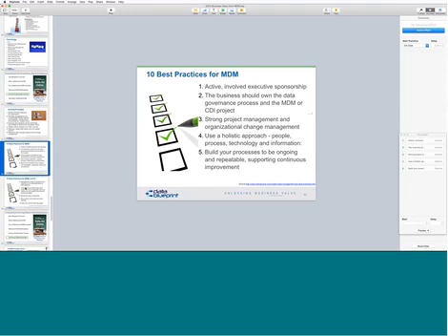The fact that you have a golden master for all your customers, what does that really mean? Well, if it's reducing the amount of time that it takes to be in contact with your customers, that's great. If it's making your data scientists in your organization more productive, that's good. But if the data scientists only deliver $1 million value and your MDM costs $2 million, you've still got a problem there. So again, trying to get to that business case with those activities is very definitely the way I would say are necessary but insufficient criteria for success.